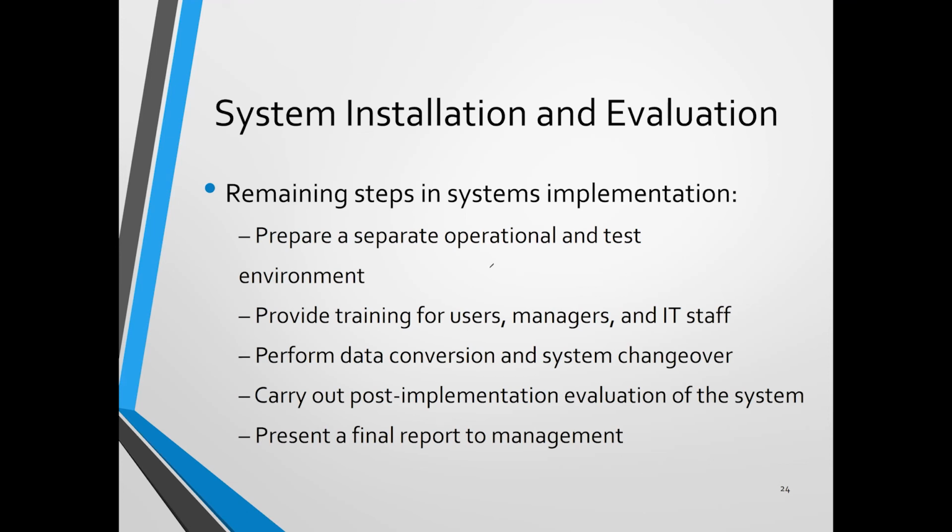Okay, so for the remaining steps that we have, the first one is that you have to prepare separate operational and test environments, especially if you would like to set it up on a new server. Does the server work well? What about the network? What about the electricity? Or if you would like to set it up on the cloud, what about the internet connection? Are there any ports that are blocked? Is everything okay?